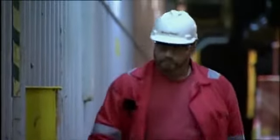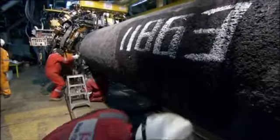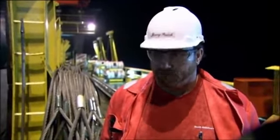Today's target, we're way off. We're laying probably 6 double joints of pipe today. Not so good at all. But it's better than having to lay the pipe down. When the weather does break, we got the pipe up, we're ready to roll. So as soon as the weather breaks, we can take off and start laying pipe.